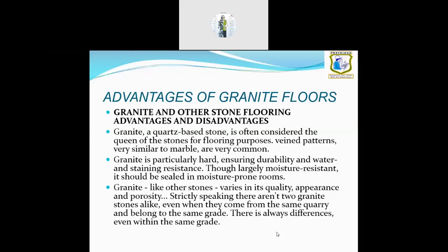Economy granite is available in 6x8 size or in 4x6 size, so it is available in bigger sizes. Here, the cutting should be planned properly, depending upon the availability of material. The architect will ask you what size you are getting, and he will do the grid pattern of the tile or granite laying and give it to you. So drawing is very, very important in this case. Otherwise, you will end up with more wastage of material.